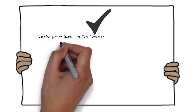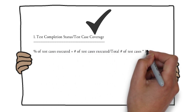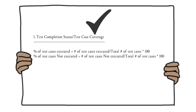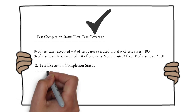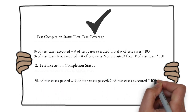The first calculated metric is test completion status. If our aim is to complete a thousand test cases in 12 days, we track daily completion percentage using the formula: (number of test cases executed / total number of test cases) × 100. Similarly, pending test cases percentage = (number of test cases not executed / total) × 100. This gives the test completion status on a daily basis.